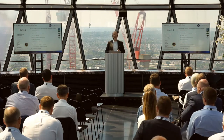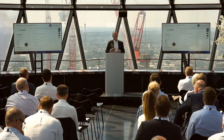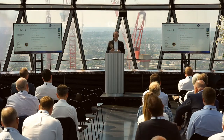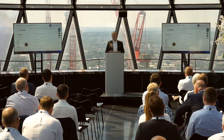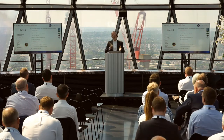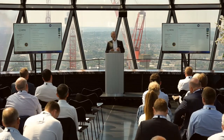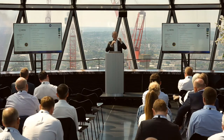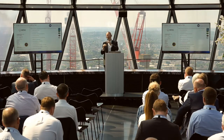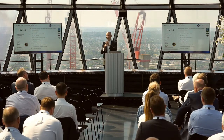So let's talk about the design phase commissionability plan. Show of hands, who here normally provides a design phase commissioning plan pre-tender? No hands. Okay. So this might or might not make it into the new CODEM. I hope it does. This is really powerful because when you go out to tender and then you go into contract with someone, the only thing you can ask those people to do is what's in them documents.